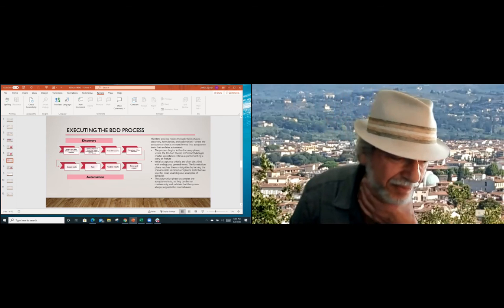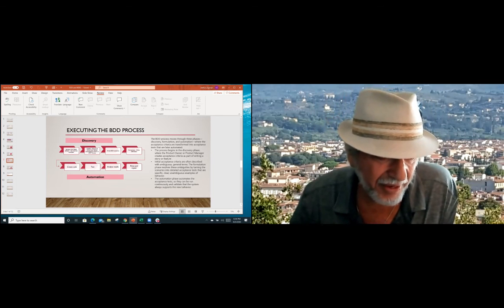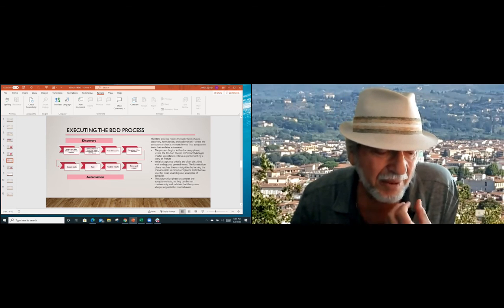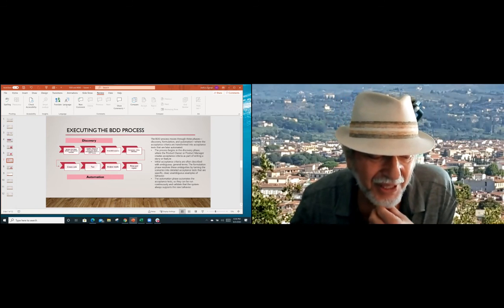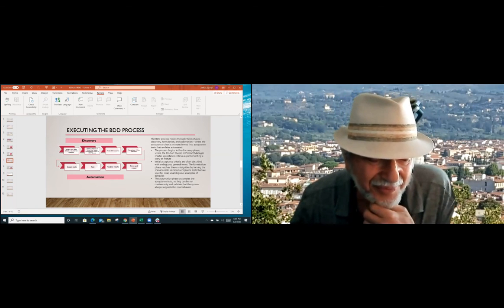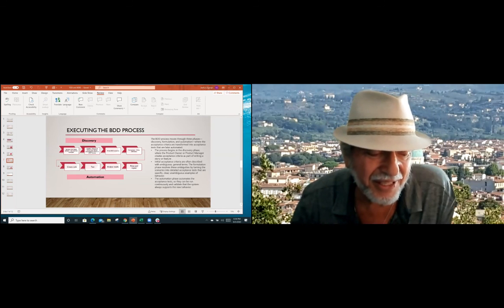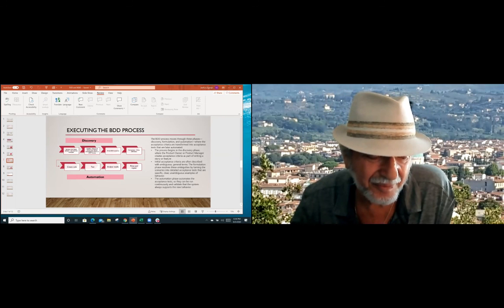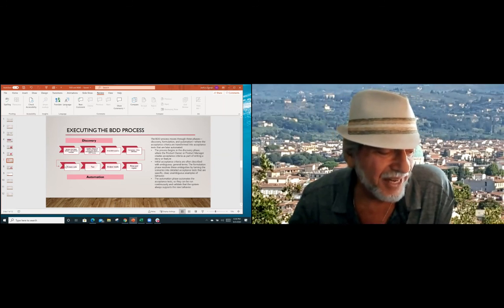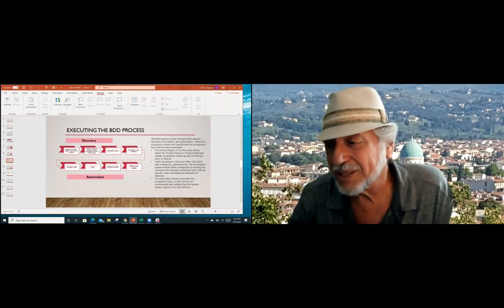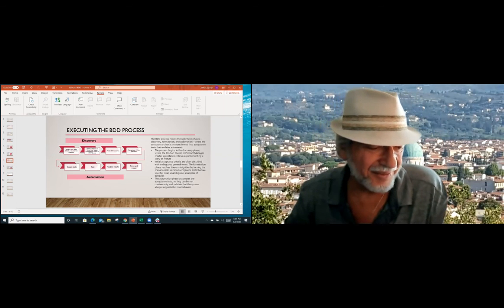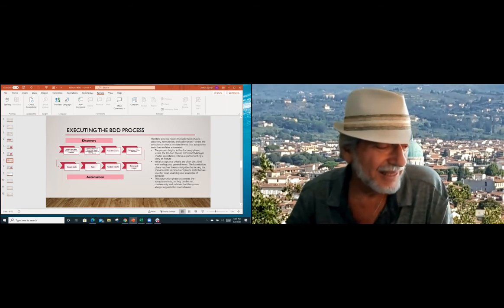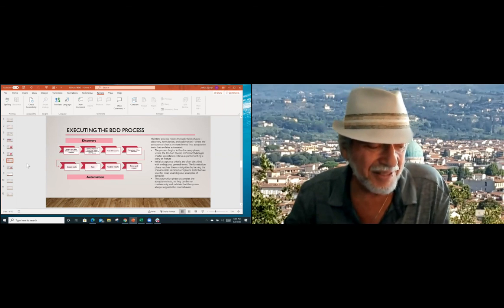Now what happens is that, okay, I went through this first part over here, and I got my acceptance criteria. But then what happens is there's an initial criteria, but then they're kind of general terms. So there's a phase called formulation, and you resolve the ambiguities, turning the stories, the scenarios, into detailed acceptance tests. The automation phase down over here is where you start to get into the tool piece and putting these things into tools and taking them through the develop test process. I'm going to stop there a second and see if there's a question over here.